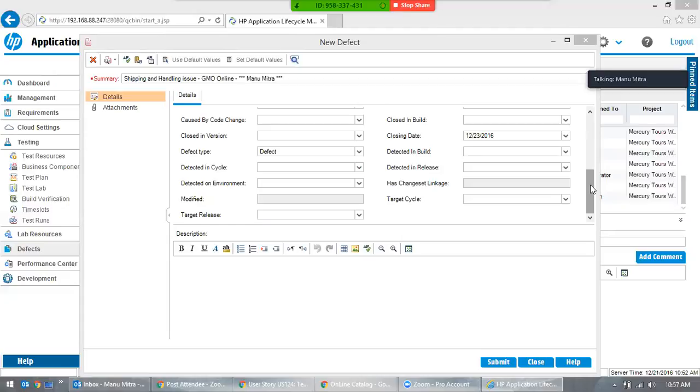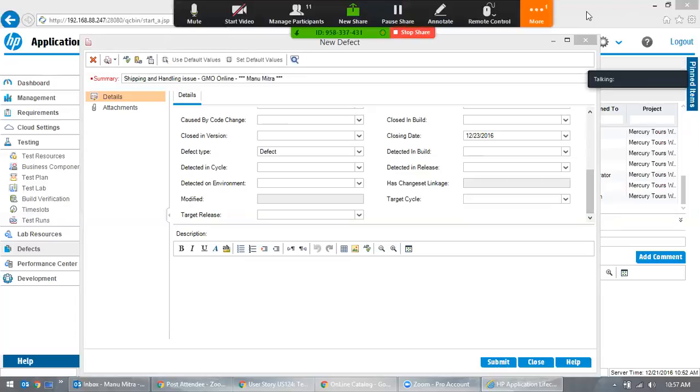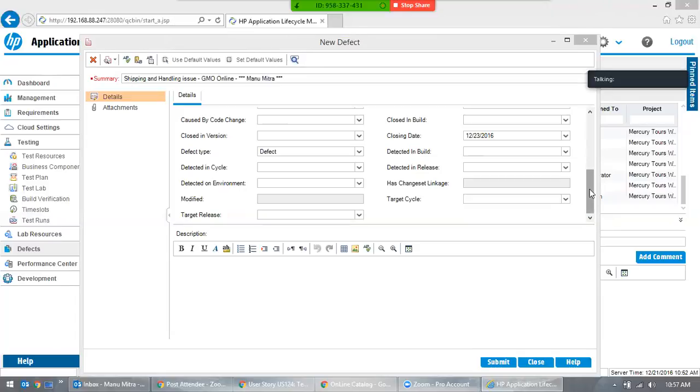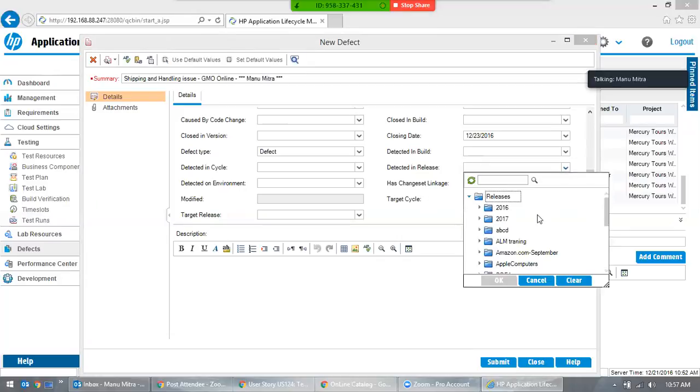They say it's fixed, but when you're testing that defect it is not fixed, then you want to reopen it. In that scenario, you can reopen, but if the defect is already closed and it's been more than 1 month, then you don't want to open that defect, unless specified by a lead. Normally you can open a brand new defect.